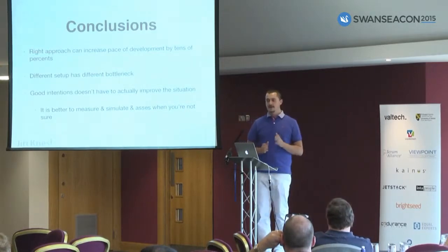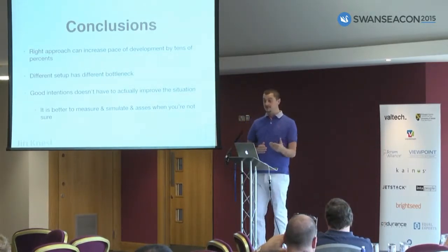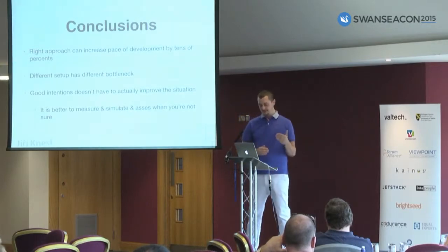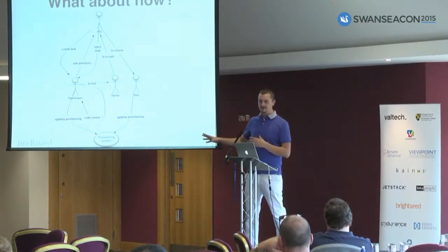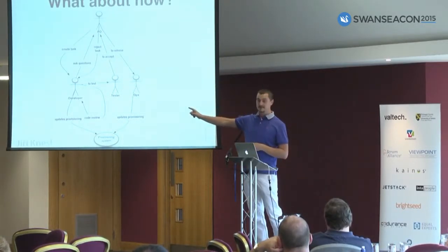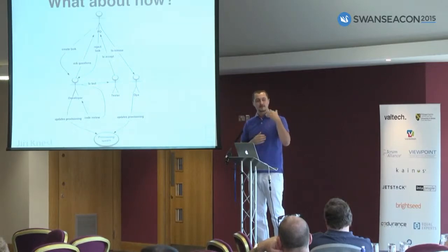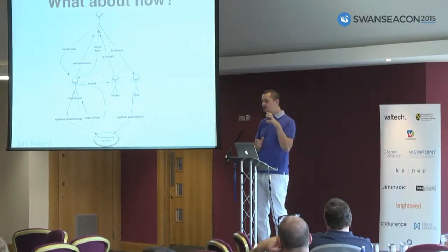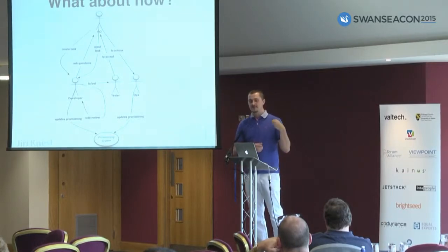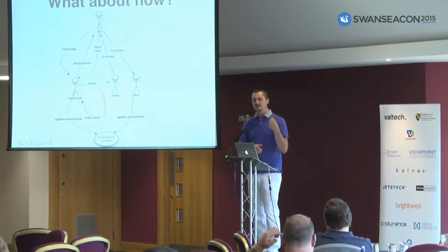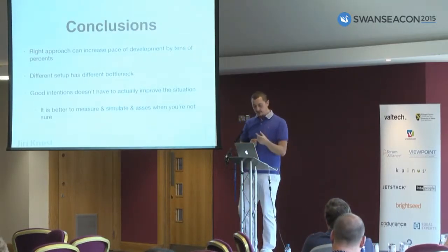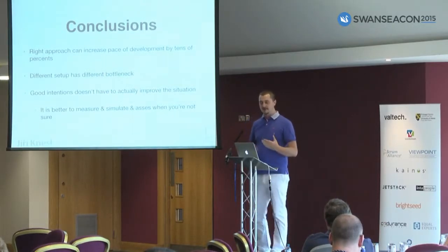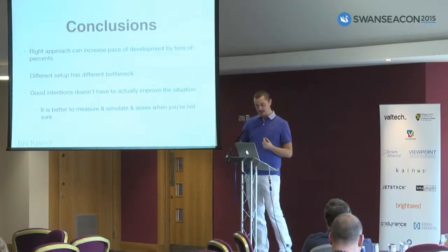The right approach can increase the productivity of development by tens of percent, really a lot. But for example, when development is a bottleneck, trying to force your developers to do DevOps means that they have less time for development, and it can actually harm software development. So, good intentions don't necessarily improve the situation. Be very careful when thinking about the situation in your company.